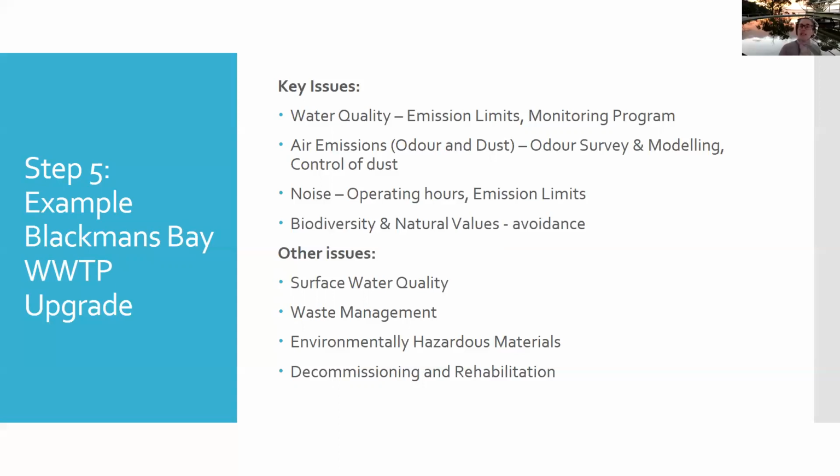Yeah, I guess avoidance is something you really do in the planning stages. So remember, when we issue the guidelines, they have to give us a report, an EER or an EIS. And that very rarely is the first report signed off. It's usually multiple iterations. The assessment officer will review that report against the guidelines, and as they're doing their site-specific surveys, they're getting more information about the issues and risks, and you might find that the proposal changes, because in their mind is the fact that they need to get approval.